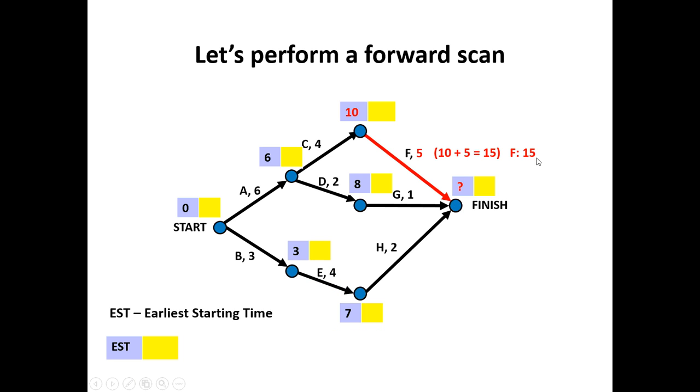Ten plus five gives me fifteen. However you notice I've got one, two, three possible activities leading to my finish point. So if I follow activity F, it will take fifteen minutes to complete the earliest possible time. Following G, it's an eight plus one gives me nine. H is a seven plus two gives me nine as well. So here, in my last particular collection of boxes, I have three options. A fifteen, a nine, or a nine.